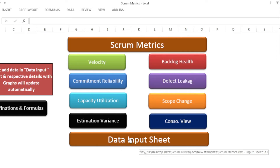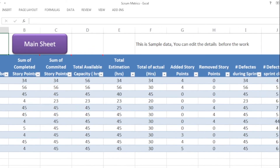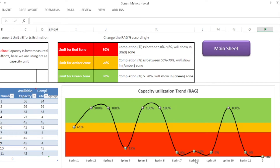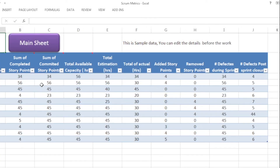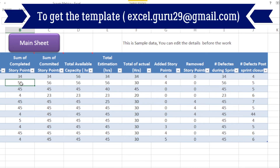This sheet shows some scrum-related dashboard keywords. All you need to do is start inserting all your details in this sheet, and from this sheet the respective details will move into the respective sheets in order to prepare the respective metrics. Let's see what these columns are. First, you need to mention your sprint number. Column B says sum of completed story points — here you need to put what is the total sum of completed story points in that particular sprint.